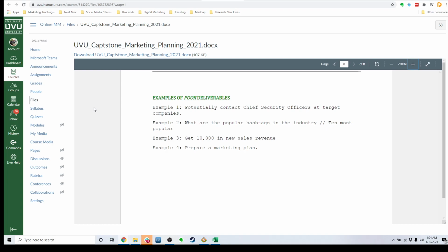Number 2, what are the popular hashtags in the industry? 10 most popular. This is a good start, but this goes back to that question, is this a task or is this a deliverable? How long would it take me to accomplish this deliverable? How many tasks are required to get this one done? In this case, this is probably something I could do in at most 1 hour, probably 30 minutes. That's not a deliverable, that's a task.